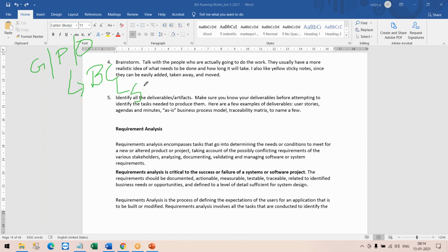At the same time, I do the stakeholder analysis, I identify my stakeholders and do the analysis of each of the stakeholders, how to engage them. And then the project got an approval. Project kickoff happens. And we also do a requirement kickoff. We take the calendar time for all the stakeholders and we block it for my requirement elicitation. We get into the requirement elicitation. As a part of elicitation, you can follow interviews, workshops, prototyping, JAD, and so on. You start getting the requirements.